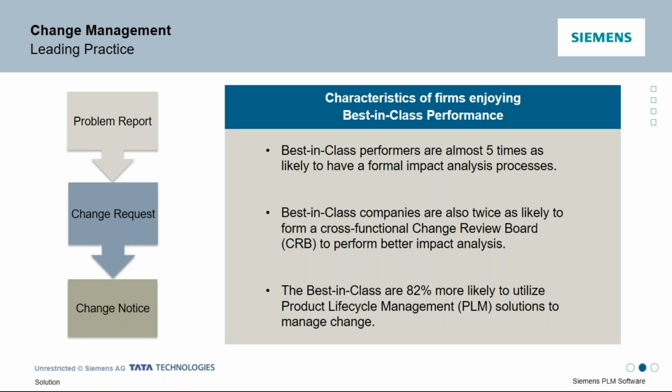The leading practice in the industry to address this challenge from a process standpoint is to ensure that we do a formal impact analysis before we commit to a change, right? And it's preferable to do that impact analysis by a cross-functional or interdisciplinary change review board.